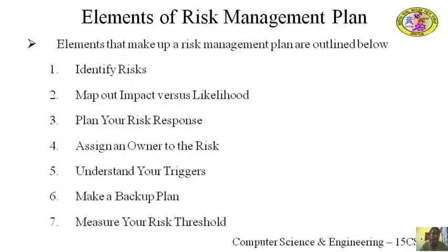Additionally, create a risk repository that you can share with everyone you interviewed, for a centralized location of all known risks revealed during the identification phase. This can be conveniently done on online project management software. Many risks can be divided up into categories like technical or organizational and listed out by specific subcategories like technology, interfaces, performance, logistics, budget, etc.